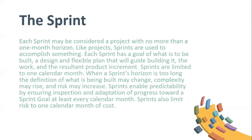Each sprint may be considered a project with no more than a one-month horizon. Like projects, sprints are used to accomplish something. Each sprint has a goal of what is to be built, a design and flexible plan that will guide building it, the work, and the resultant product increment. Sprints are limited to one calendar month. When a sprint horizon is too long, the definition of what is being built may change, complexity may rise, and risk may increase.